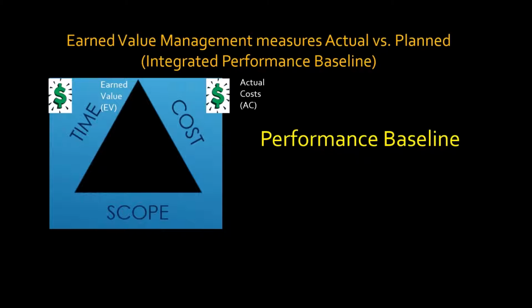Is it at the end, the actual costs? I'm going to compare that to my planned value. Remember, that's the third variable, planned value. So what did I plan in the beginning? I said that my project was going to be 3 months long and it was going to cost $20,000, right? That was my planned value, and I'm going to measure my actual progress versus what I thought I was going to do. This is where we're supposed to be when we talk about planned value.